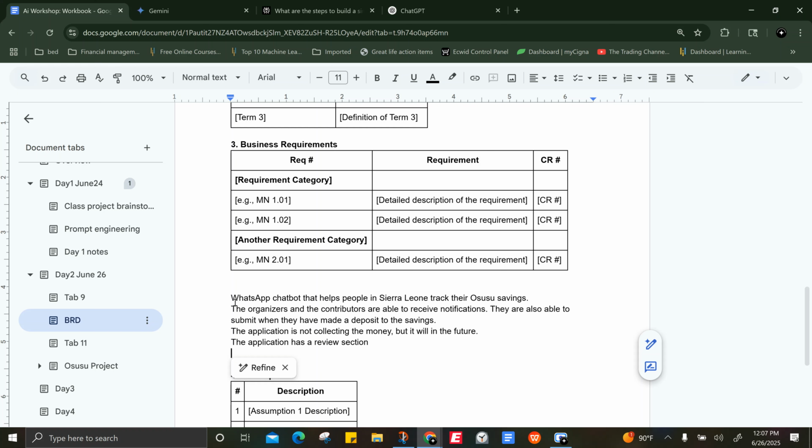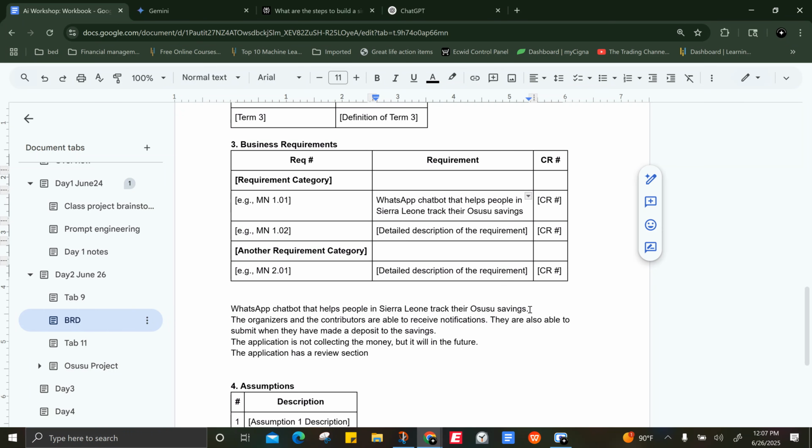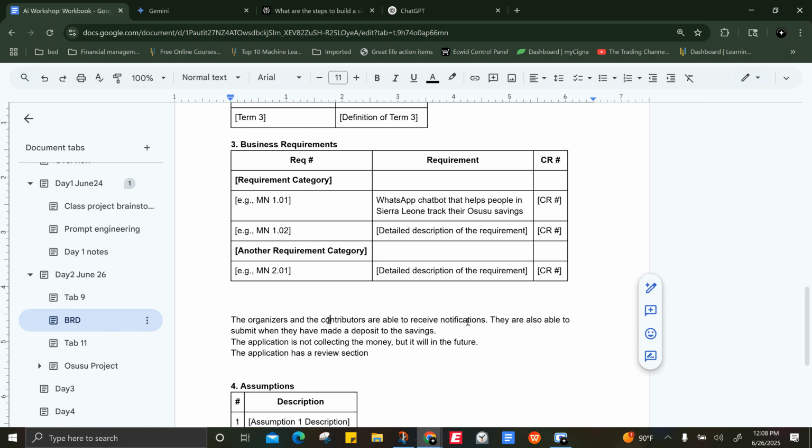Each of these, like I said before, can kind of be requirements. Maybe we might have to fix some, remove some, and add some, but they will be here. Each requirement has its own line, similar to the prompts. You try to be specific with the requirement, so you don't want one requirement to have everything, because when they build it, for them to test and validate, if we put five different features in one requirement, then when one fails and another works, it's hard to move forward.